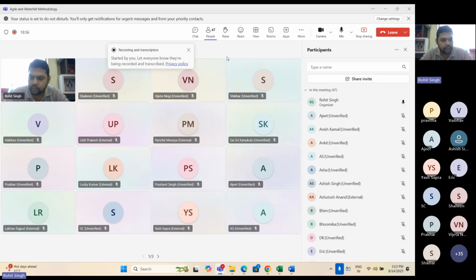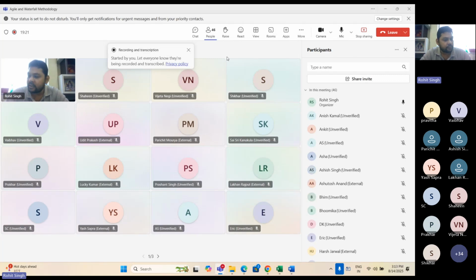Startups and small projects, 6 months, 1 year down the line they have to deliver. When it is much more prone to flexibility, change and dynamism, we use Agile. When it is a government project where everything is fixed, when it is a big project, 3 years, 4 years, 5 years, where requirements are fixed, then we use waterfall.